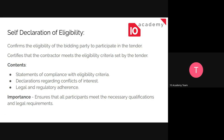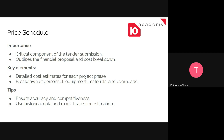It's an important document you need to check. The price schedule is for you to use in order to estimate or forecast the future budget. Its importance is that it outlines the financial proposal and cost breakdown. The key elements are detailed cost estimates for each project phase, and a breakdown for everything from personnel, equipment, material, and overhead. You can use historical data and market rates for estimation and forecasting, as discussed in the project introduction. Just ensure that it's accurate and competitive when submitting your bid.